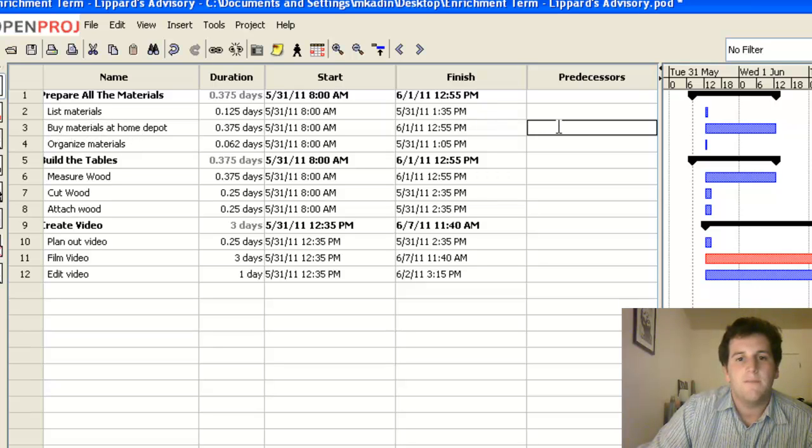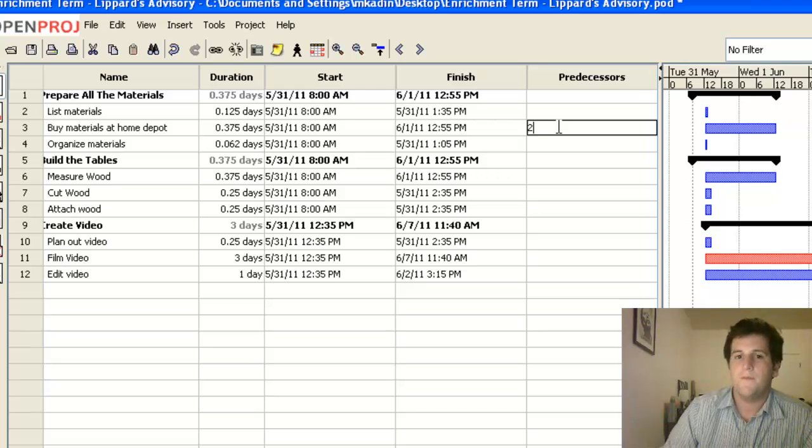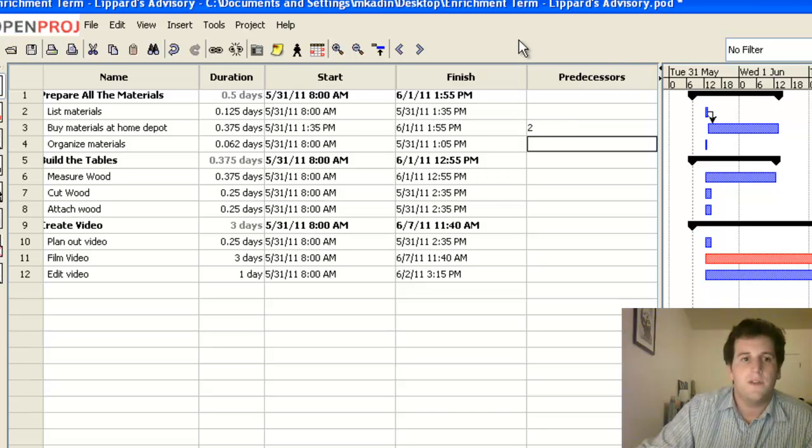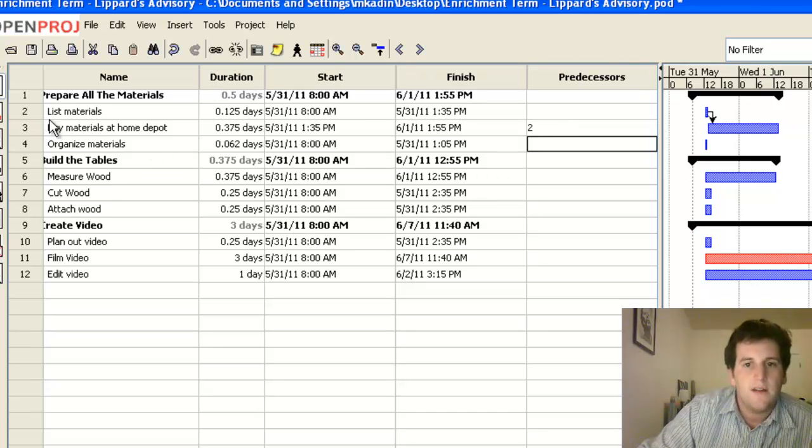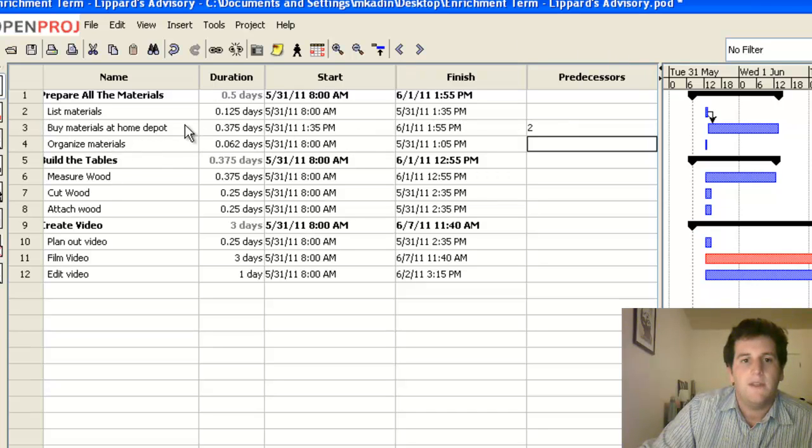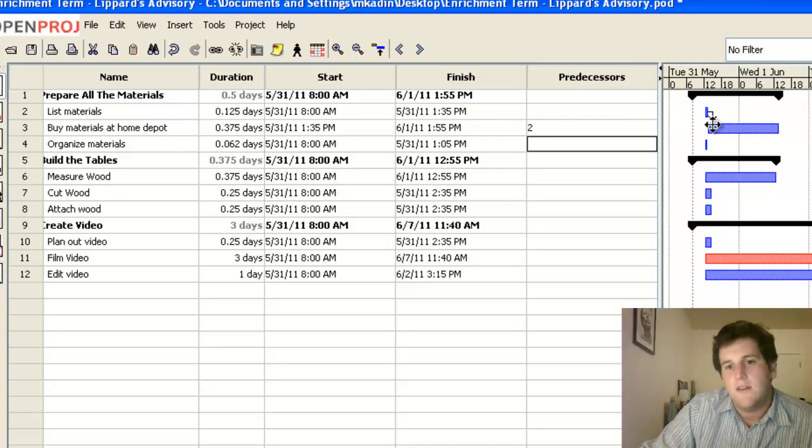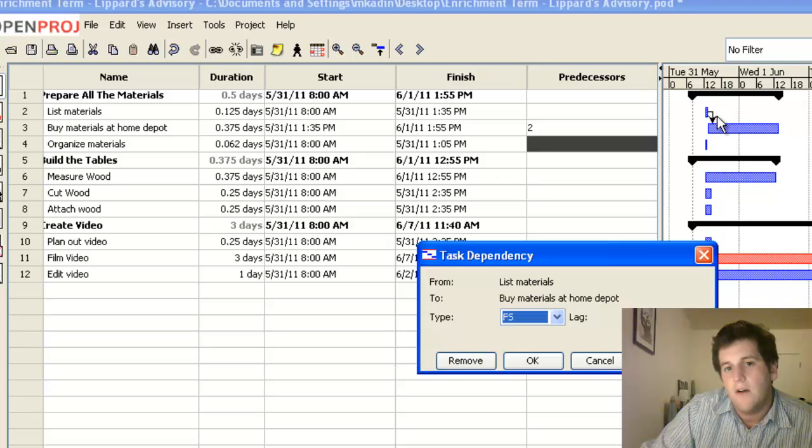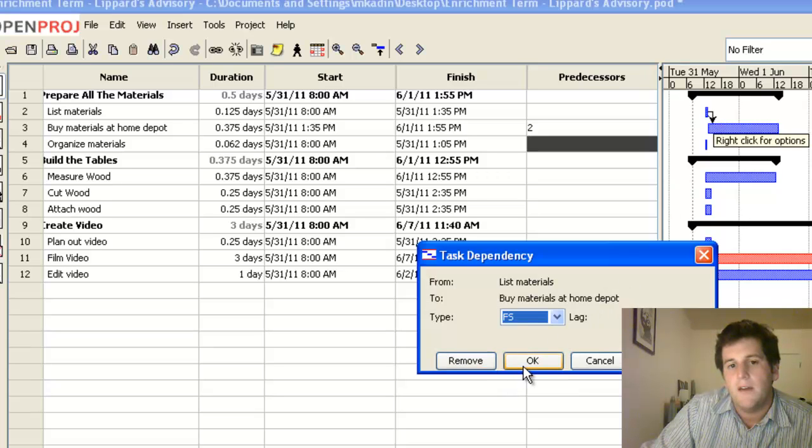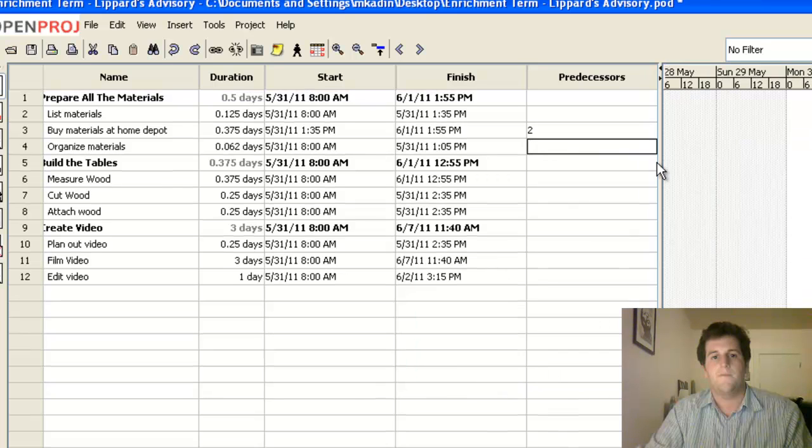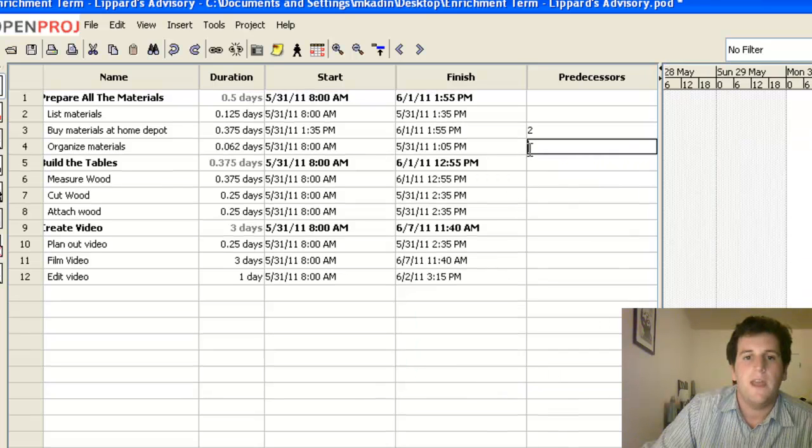So under buy materials, we can put a two because of the two that comes right here. And that says I can't buy the materials at Home Depot until two is complete. They've been listed. And you can see here on my Gantt chart, I've got this new arrow which is telling me all about it.